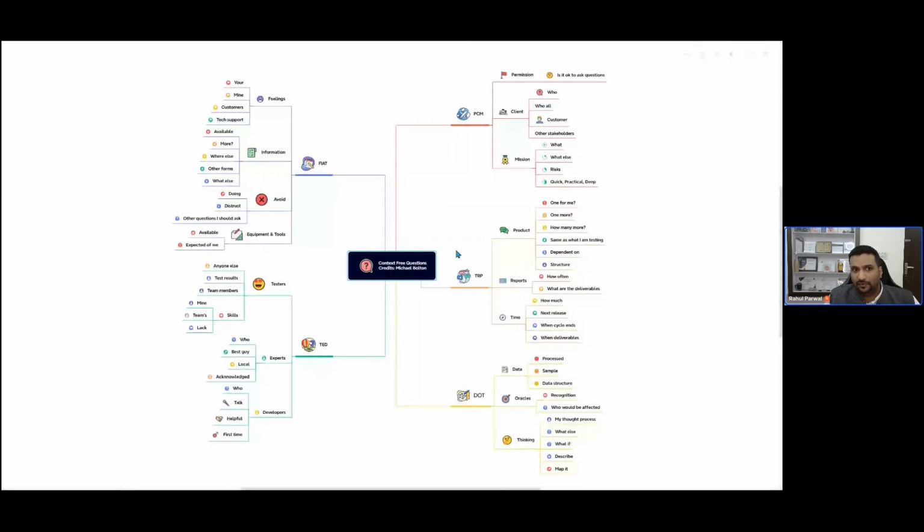Now these are context free questions by Michael Bolton, which start with PCM. P stands for permission. So the first thing I ask my stakeholders is, is it okay to ask questions? The moment they say yes, I ask them, who is the client? Who all are the clients? Who is the customer who is paying for it? Are there other stakeholders? What are their missions, and what are the risks in that mission? And do you want me to do a quick work, a practical work, or a deep work?